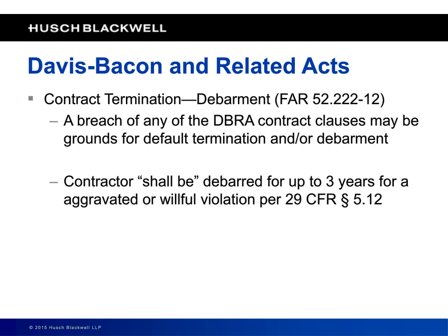That involved a contract between Circle C and the Army to build 42 warehouses at Fort Campbell in Kentucky. And what happened was Circle C failed to include Davis-Bacon Act clauses in its electrical subcontract with a company called FaceTech that was going to do all the electrical work on these projects.